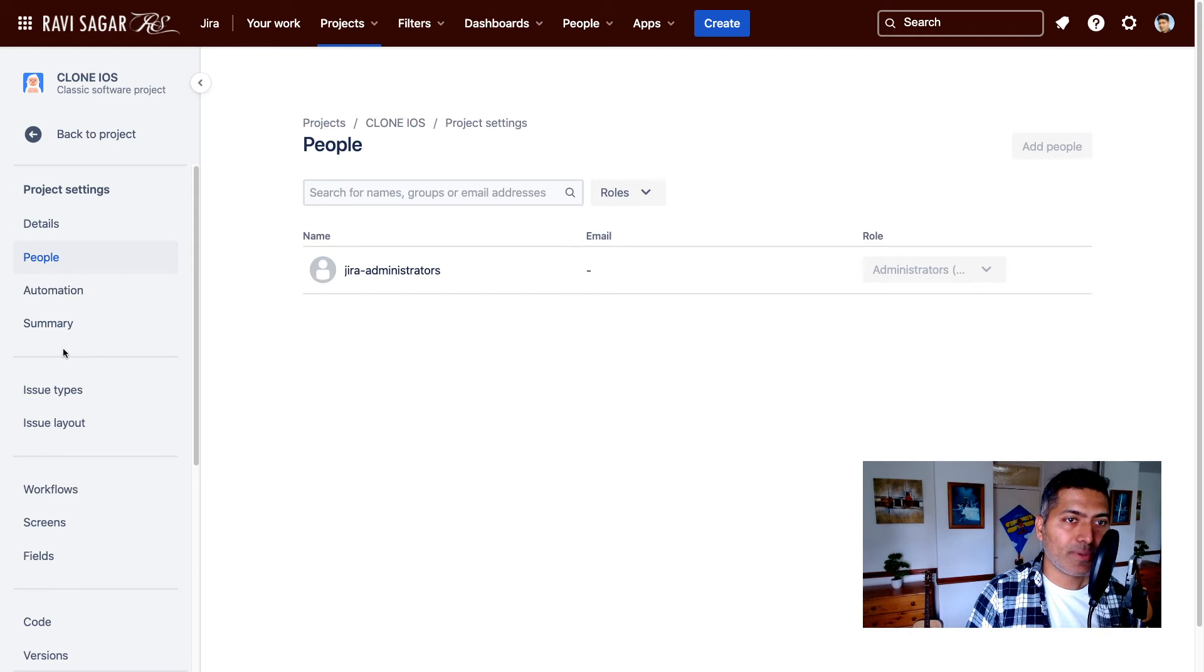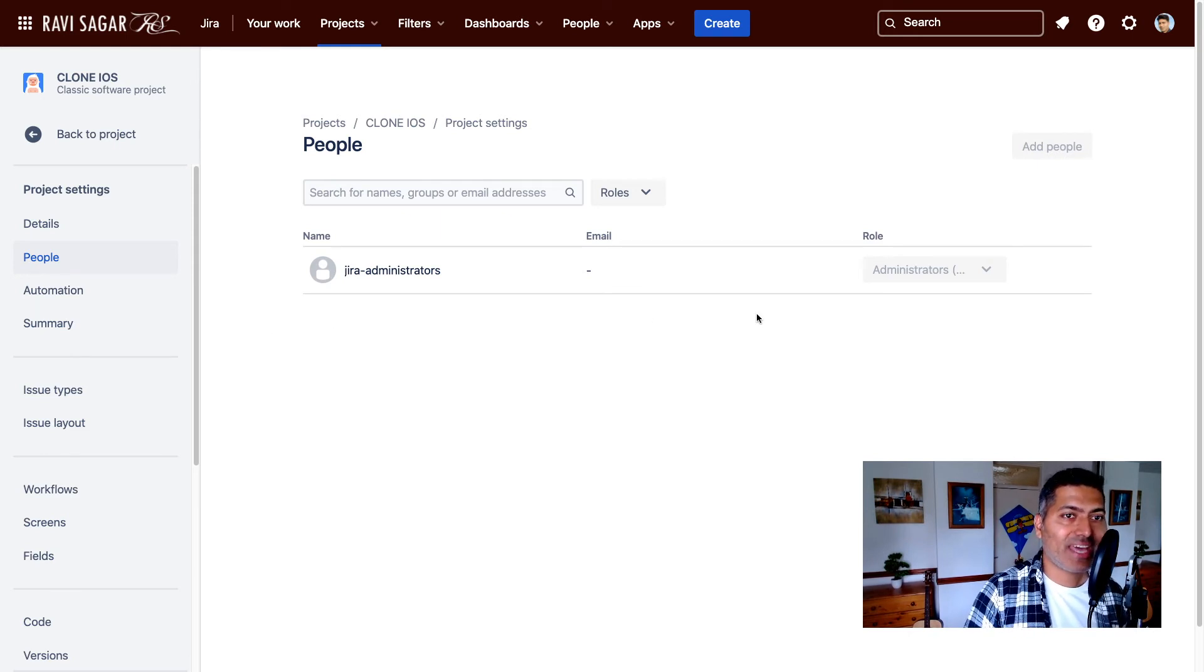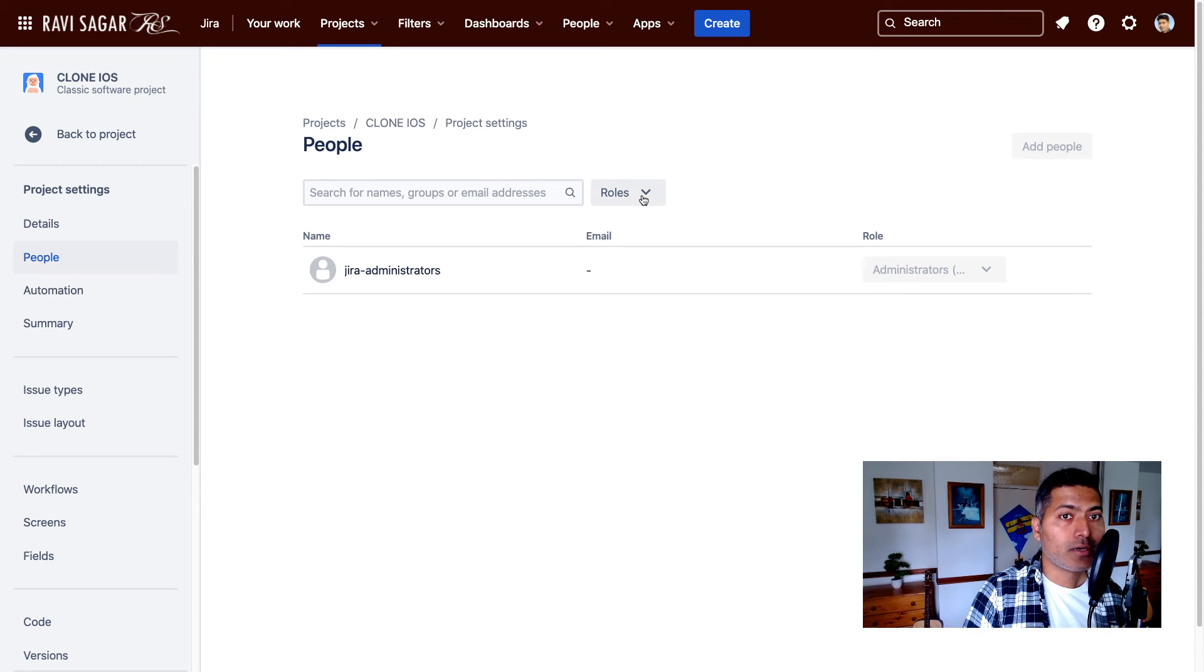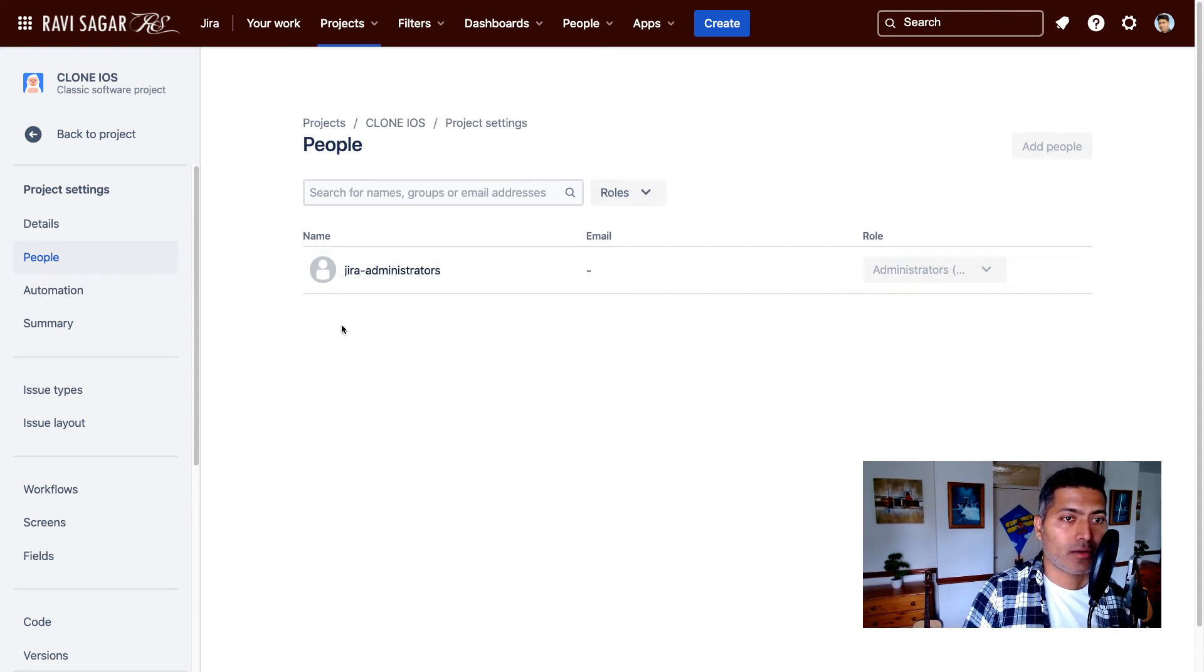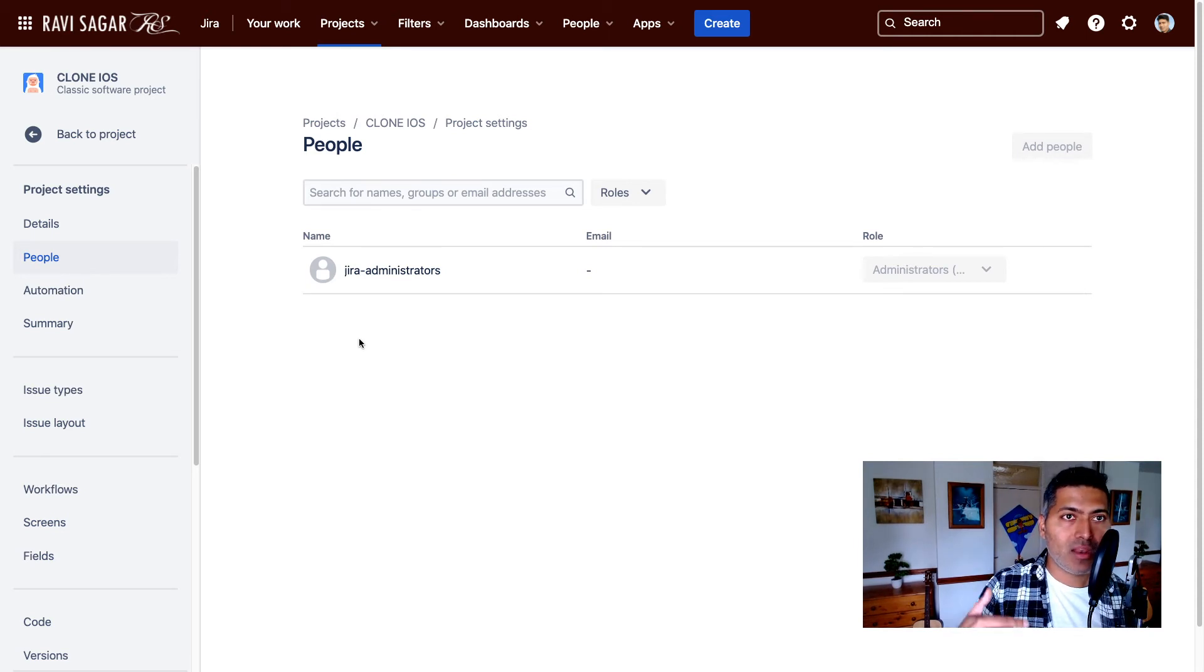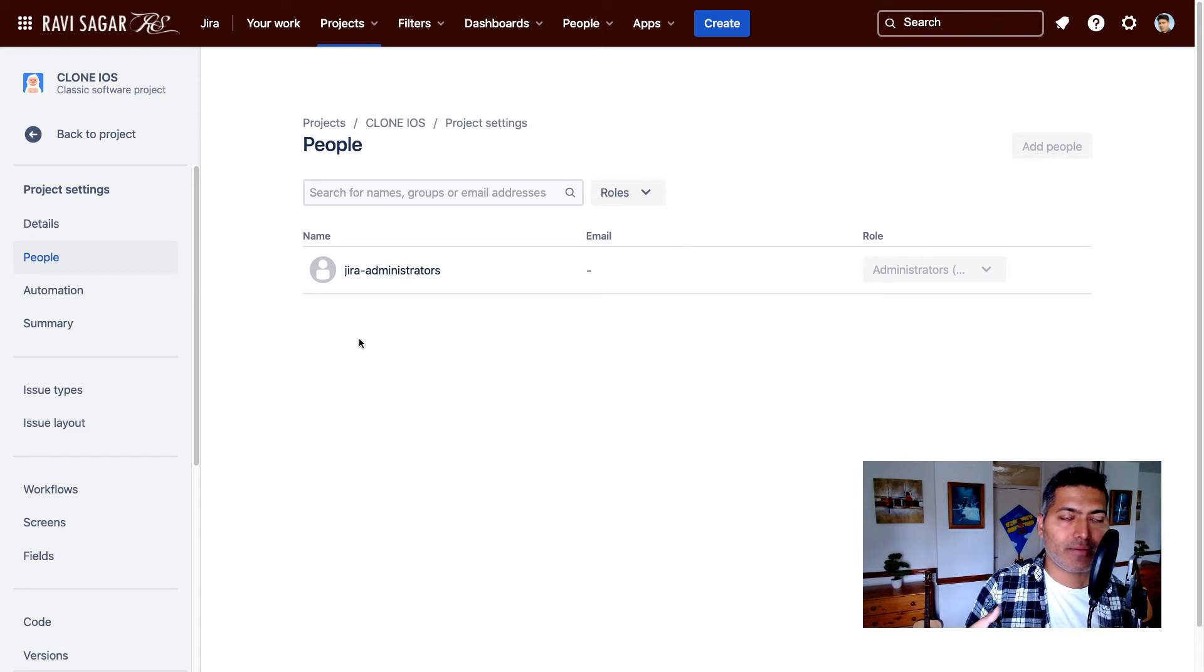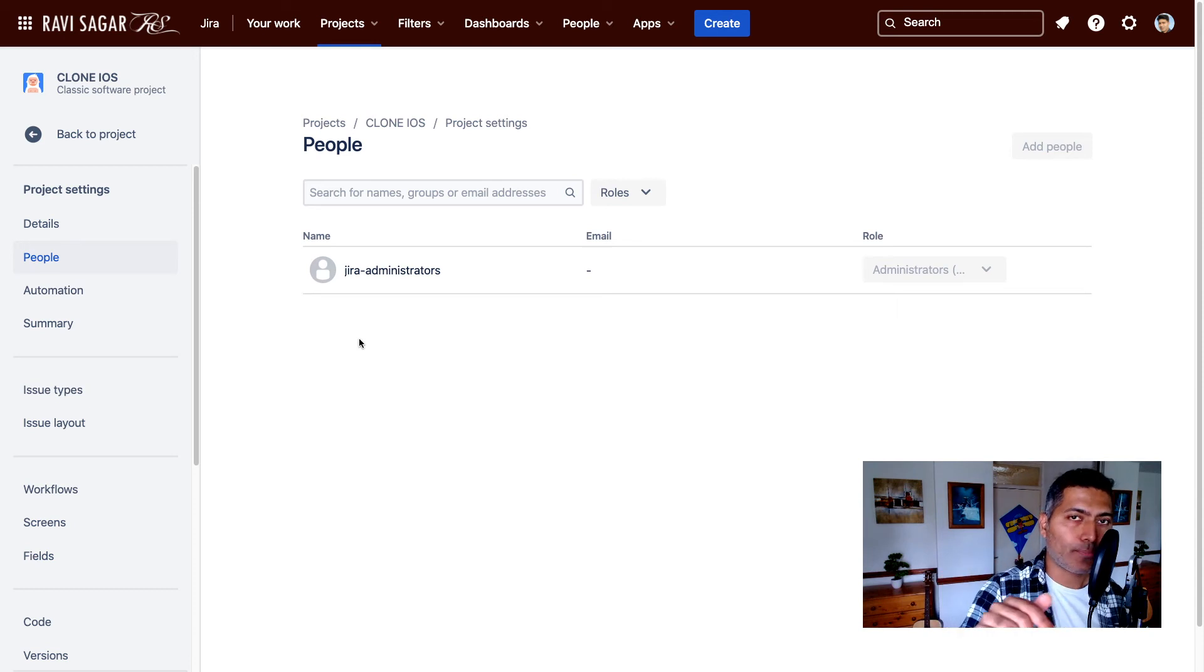the project admin, or maybe you have a Jira administrator can then add actual vendors to the vendor role. Now, when you add people to the vendor role, those people who have been added to this particular role will get access to only that particular project.